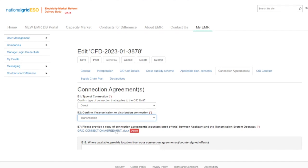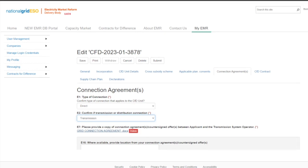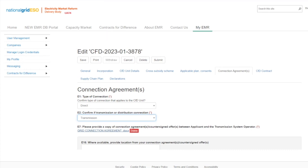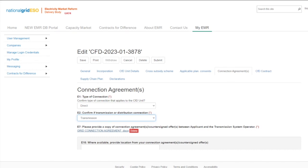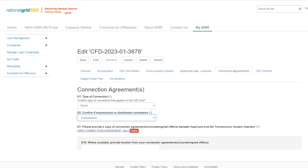The applicant will then need to provide a copy of the connection agreement or countersigned connection offer between the applicant and the transmission system operator in Question Field E7, including signed acceptance forms where applicable. When uploading the connection agreement documentation including the connection offers and acceptance letters, please ensure that it is signed by both parties and meets the criteria as stated in Schedule 5 of the allocation framework. Please note that if the project technology type is offshore wind and is transmission connected, then additional questions will appear regarding single metering or apportion metering for each phase.